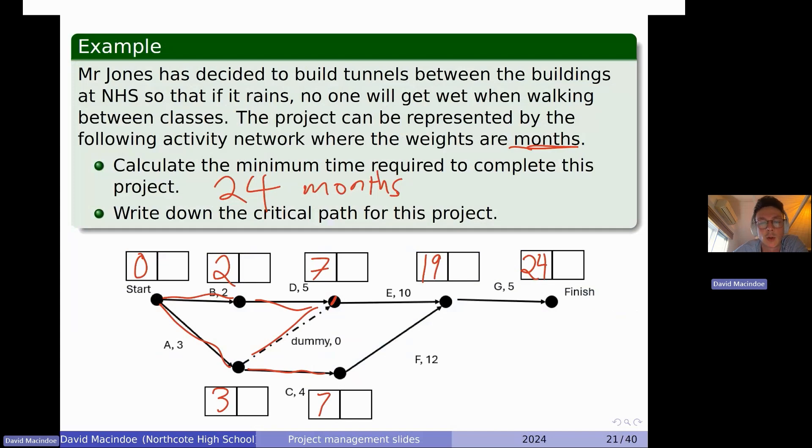Now we need to do the critical path. So we've already got all the ESTs. We do the LSTs and then see where there's no float time, so where these two boxes give the same number. So the first thing we have to do to get the LSTs is in this last box, we just put whatever is in the other box there, the EST for it. So it's 24. And we work backwards.